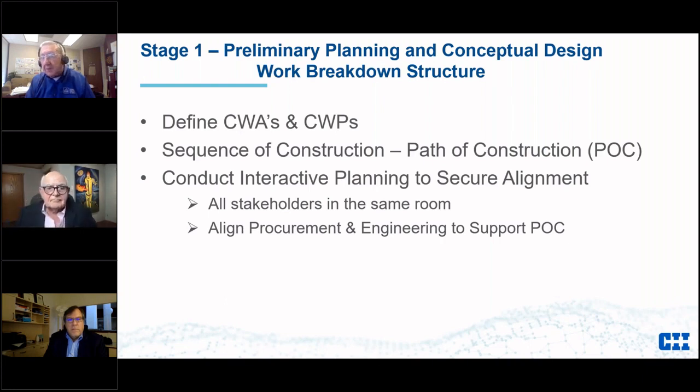Now, sequence of construction, you mentioned that, Fernando. We call it path of construction. It's just the sequence that we plan to build the project in. And that's going to drive the path of procurement and the path of engineering, like you stated. So we need to really focus on that.